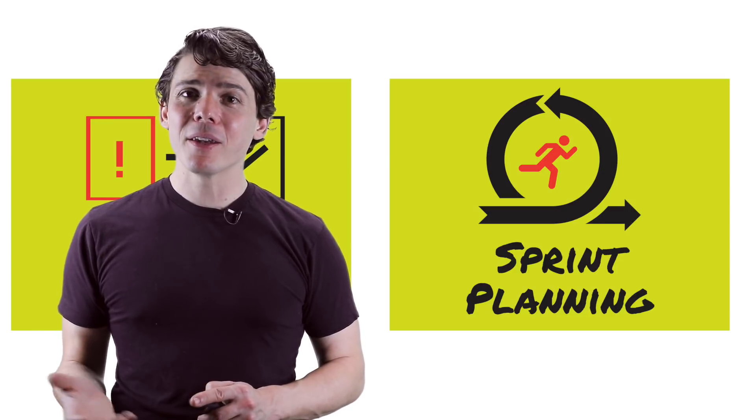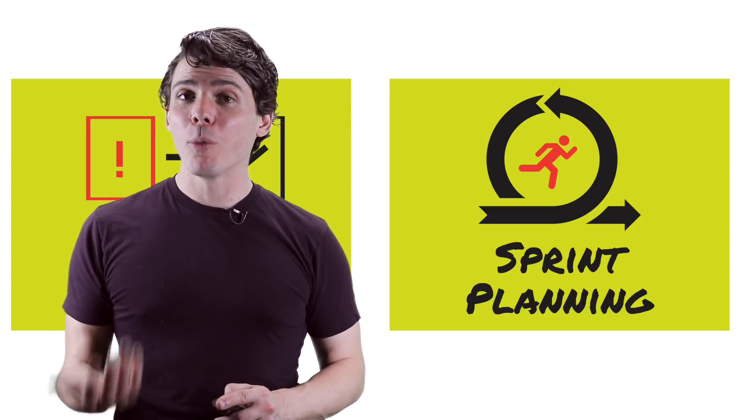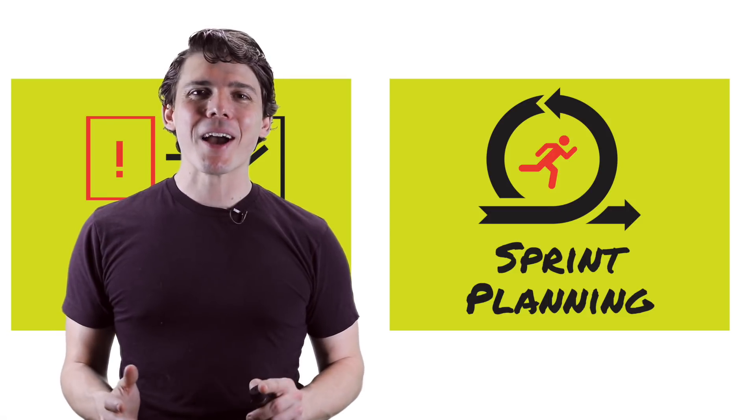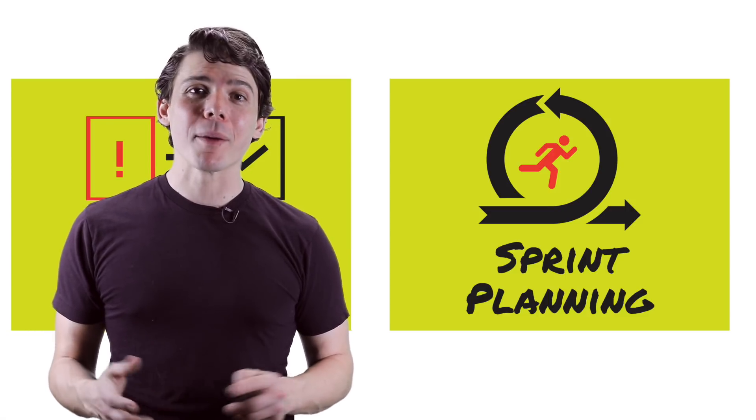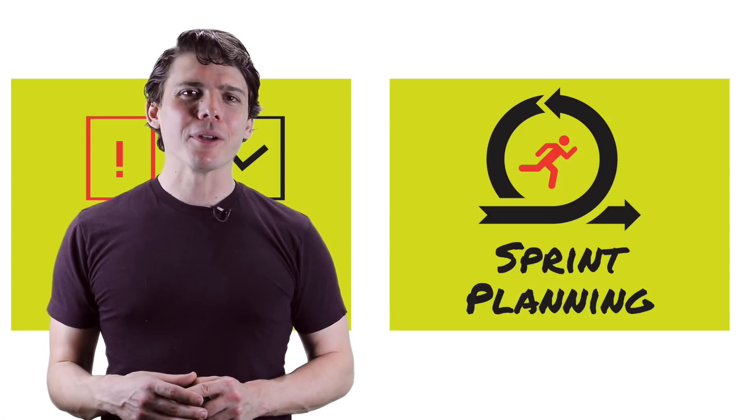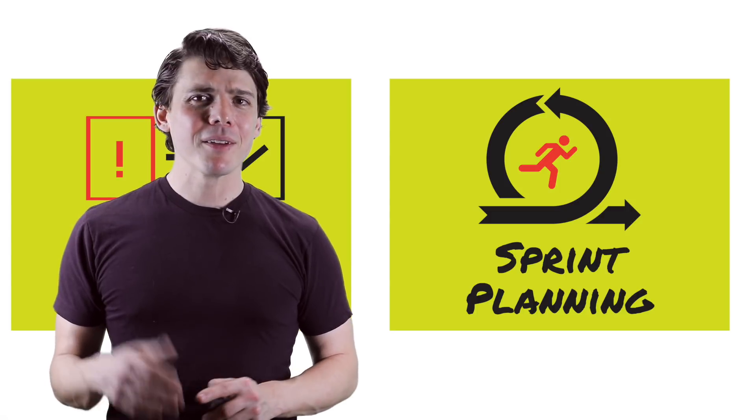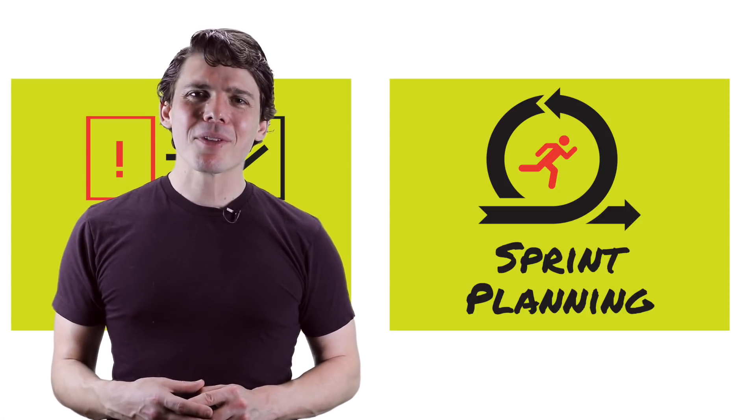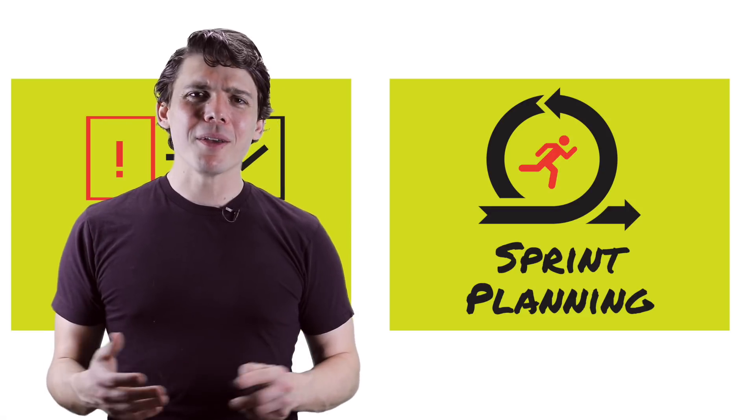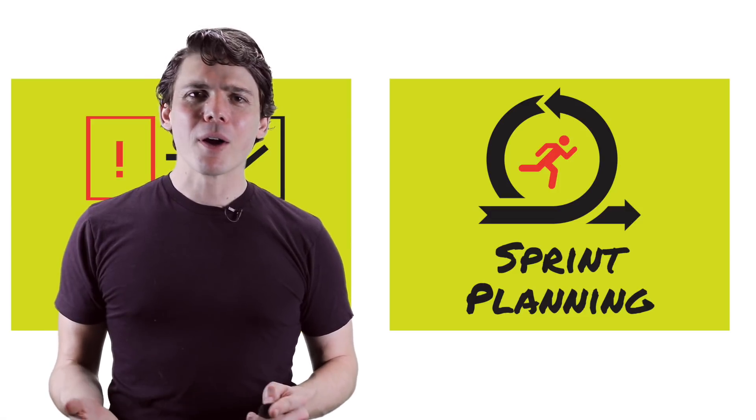The sprint itself begins with sprint planning. The purpose of sprint planning is to: A, determine what can be most likely delivered in the next sprint, and B, come up with a high-level plan for how that work will be accomplished. Only the development team can decide what it can accomplish over the upcoming sprint. They will do this by considering the work completed and left incomplete from the prior sprint, the team's capacity this sprint, and the team's historical performance.